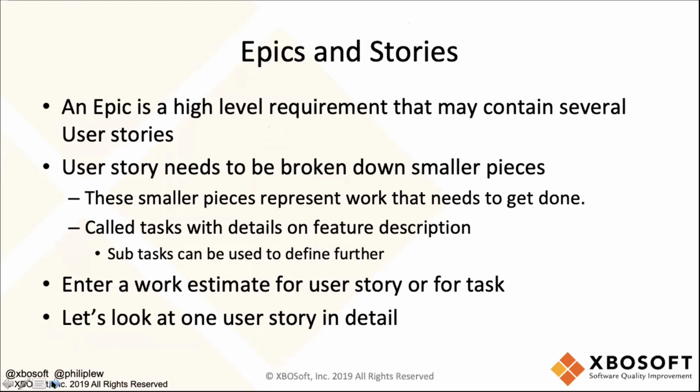Subtasks can be used to break down the work further, and then we can also enter work estimates for a user story or task, and you can do that in either hours or story points depending on how you configure your Jira. So I'm going to turn it over to Cheney, and Cheney, I'm going to let you show us how you implement that in Jira.